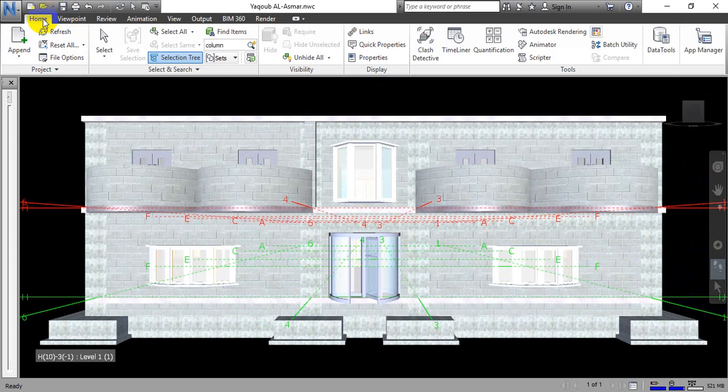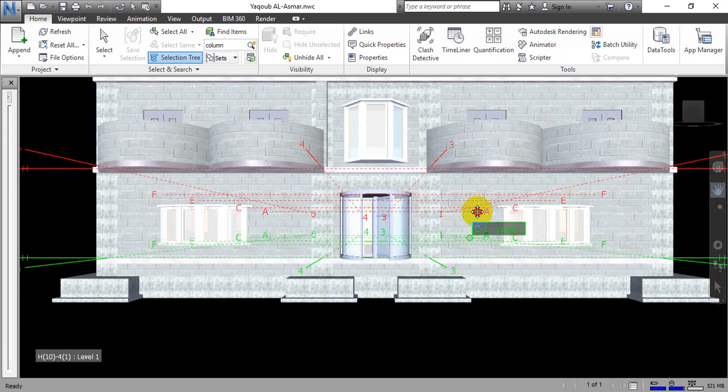Let's start work on the assigned activities. As we said, to work in Navisworks, you should have activities for the project. For these activities, you have to assign duration and the relationship between them, by Primavera or by Excel sheet. For example, we did our activities in this project by Primavera, and we assigned Friday as a stop day, and we assigned an 8-hour work day,